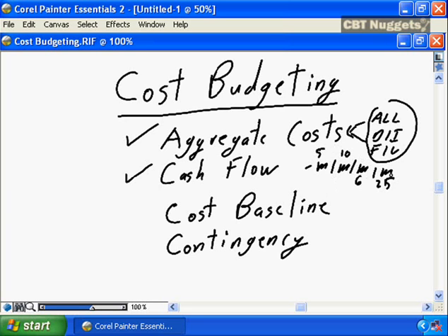That allows the financial analyst, that allows the cash management people in your organization, to have the appropriate reserves on hand so that when the bills start to flow in, when your project makes that large purchase, there are no surprises. The cash flow is available and the organization is properly prepared to deal with the cash flow requirements for your project. It's not enough to simply say, oh, you knew this was an expensive project. You need to have detailed cash flow on a month-by-month basis to ensure cash management is properly controlled within your organization.